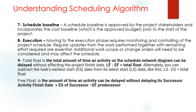Schedule baseline — when you develop your schedule, get it agreed, reviewed by the client, and have an approved budget, this becomes your baseline. Baseline means you're going to do regular updates and measure your progress against it. In short, the baseline is the reference.